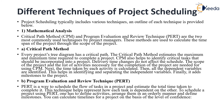To schedule a project using PERT, one has to identify activities, arrange them in an orderly manner, and define the milestones. Based upon these, we can calculate the timelines for a project on the basis of the level of confidence by what time it will be completed.